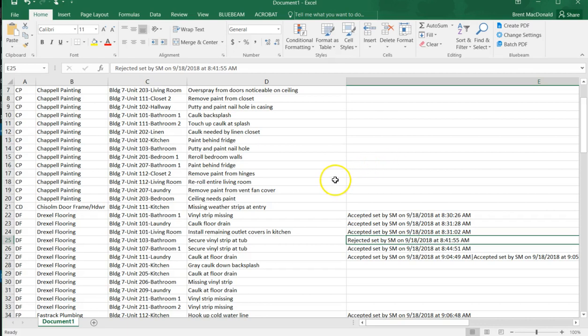But nonetheless, again, this is my experience with punch list and best practices for managing this process in the multifamily world. It does also lend itself to working well even in hospital projects where each individual room can have its own sheet. But this is also something where we're certainly encouraging and sometimes contractually obligating subcontractors to manage this process through iPads in the field as well, because this is actually something that you've seen me do on the laptop version, but this punch list is created on the laptop version but managed in the iPad app.